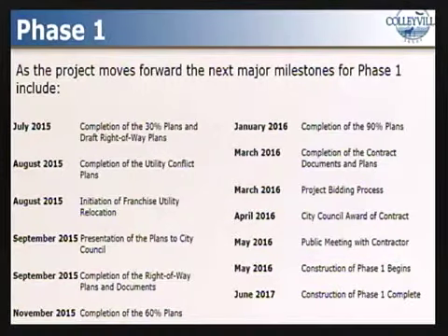This project is expected to take over a year to complete in its entirety and would place completion of this phase around June of 2017. It should be noted that this project will require road closures due to the limited space available to construct proposed improvements, and more information will be provided as we get farther along in the final design process.